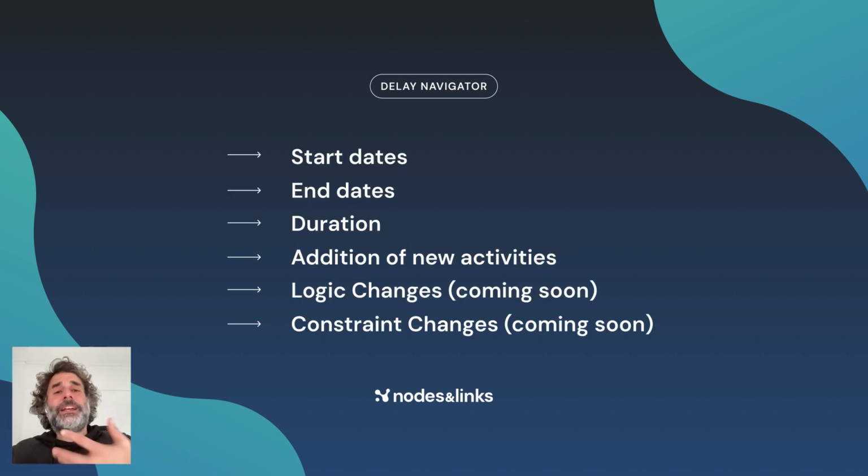Now let's have a look at how we calculate this delay contribution. Our system looks at the following factors: start dates, end dates, duration, addition of new activities, and in the following weeks, we will also add logic changes and constraint changes. How does this all work?